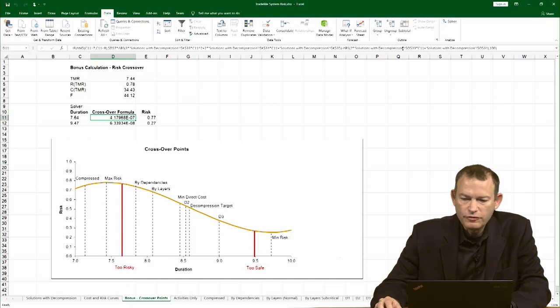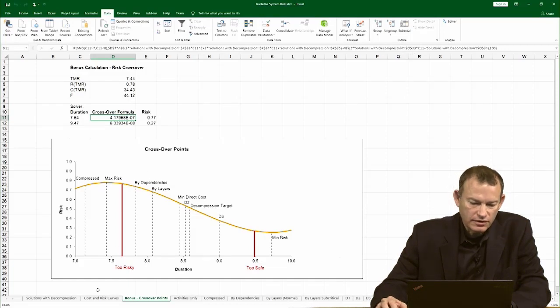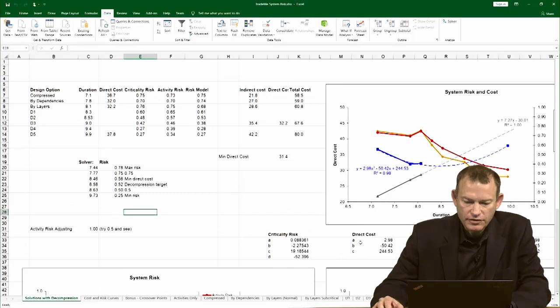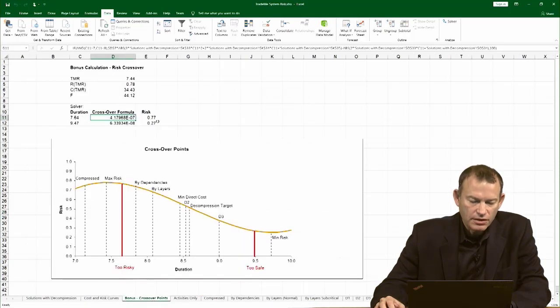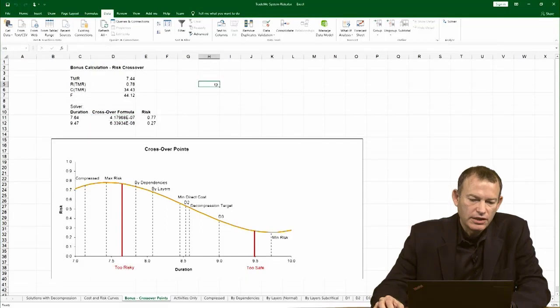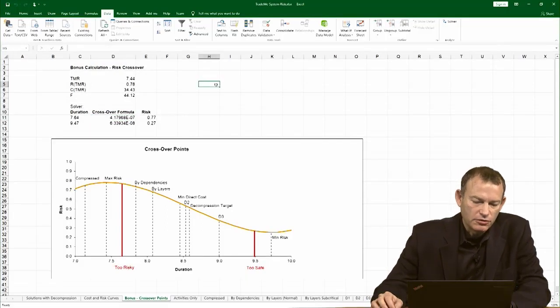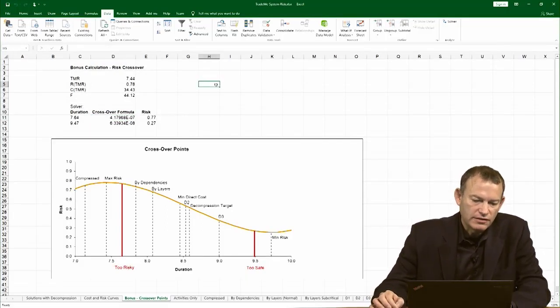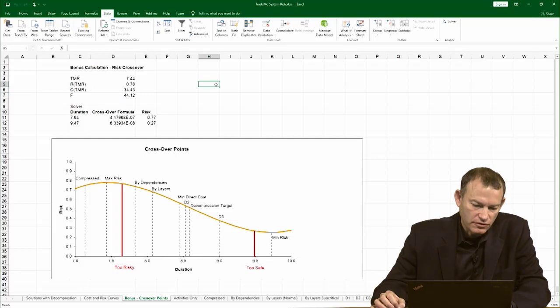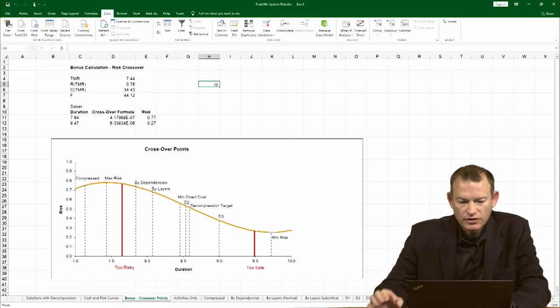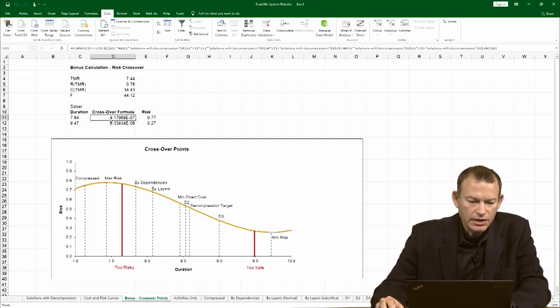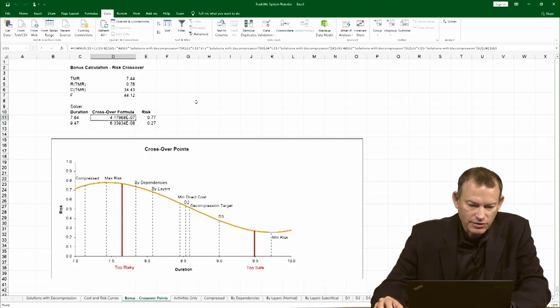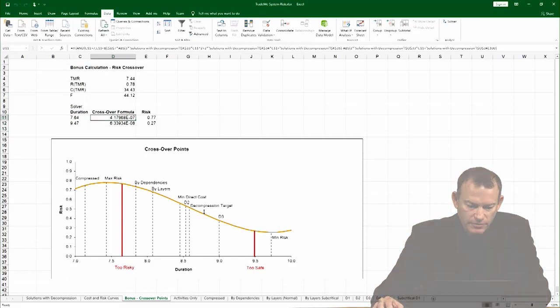This long formula over here simply takes the value of the risk model and the value of the direct cost model, calculates the risk crossover point, which is where the rate of growth of the risk is less than the rate of growth of the direct cost, scaled in absolute value. And again, this was done using a solver. 10 to the minus 7 is, of course, 0 in Excel, but that's what the solver could find.